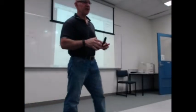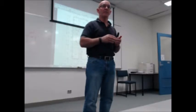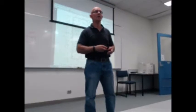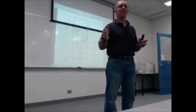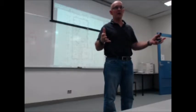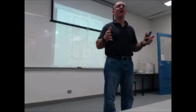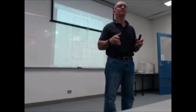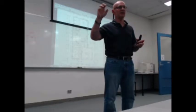So what can happen is, if it's a really shitty tiling job, okay, using this example, the tiles are good, the tiler didn't say anything because of the reasons you said. And now we're sitting here with drama. We've got two options. We delay handover until the problem is rectified, or you have an argument about whether it's a fault or not. If it goes that far and you can't come to an agreement, it's usually going to end up in arbitration, mediation, all that.